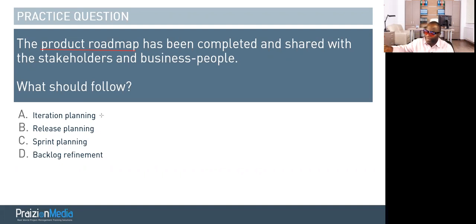If you look at PMI's depiction of this in chapter 6, they show you the vision comes first. After the vision, let's take a look at page 216. Product vision drives product roadmap. Product roadmap drives release plans, page 216. So I would have been expecting you, if you're getting done with the roadmap level, come down to the release level, then you go down to the iteration level, as you can see on page 216 in this book of all books. So the fact that A and C are the same thing, it should have already stuck out.